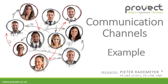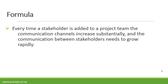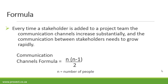Hi, my name is Pieter Rademeyer and in this video we will be discussing the communication channel formula and do a communication channel example. Every time a stakeholder is added to a project team the communication channels increases substantially and the communication between stakeholders needs to grow rapidly. The communication channels formula is n times n minus one divided by two, where n is the number of people.